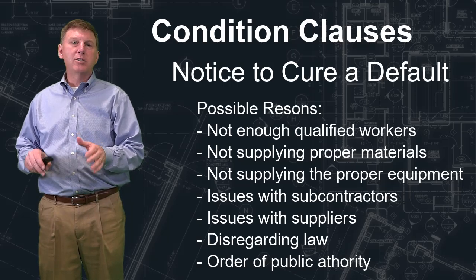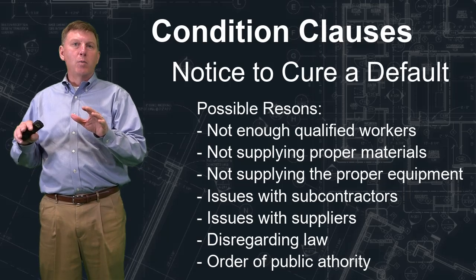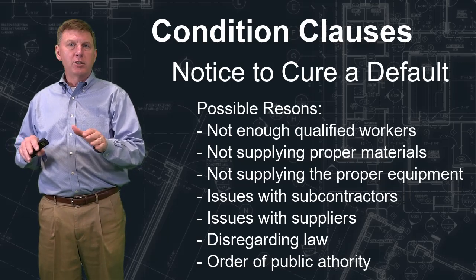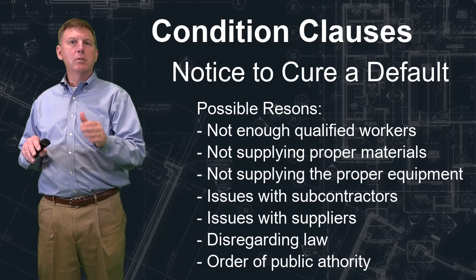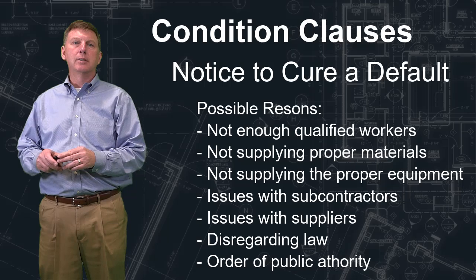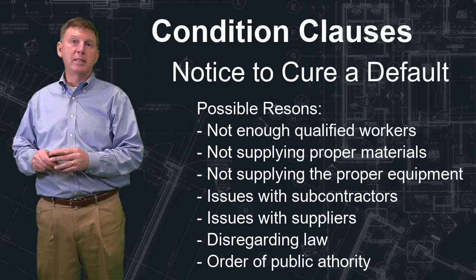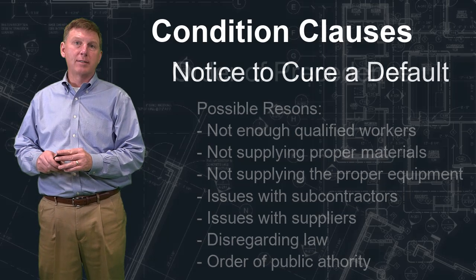Worse yet, let's say you're just disregarding the law. So once you get that notice to cure default, if you don't cure that default in the terms set by the contract, usually a certain number of days, you will be held in breach. And it could mean the termination of your contract.